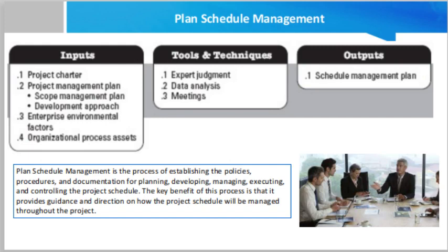Level of accuracy. The level of accuracy specifies the acceptable range used in determining realistic activity duration estimates and may include an amount for contingencies. Units of measure. Each unit of measurement, such as staff hours, staff days, or weeks for time measures, or meters, liters, tons, kilometers, or cubic yards for quantity measures, is defined for each of the resources.